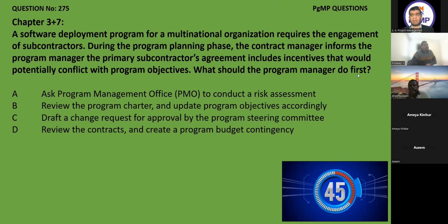So in the whole perspective, the important concept is first look into whether he does the real work, which is reviewing or doing something. Once he has reviewed it, but finds that this is mandated to be changed or some document has to be updated, or it will create a major scope change, for example, then in that case we will go for C, draft a change request and ask for approval from the steering committee. Whenever I want to go to the steering committee, it means it's an escalation issue. Okay, and escalation is never the first step.